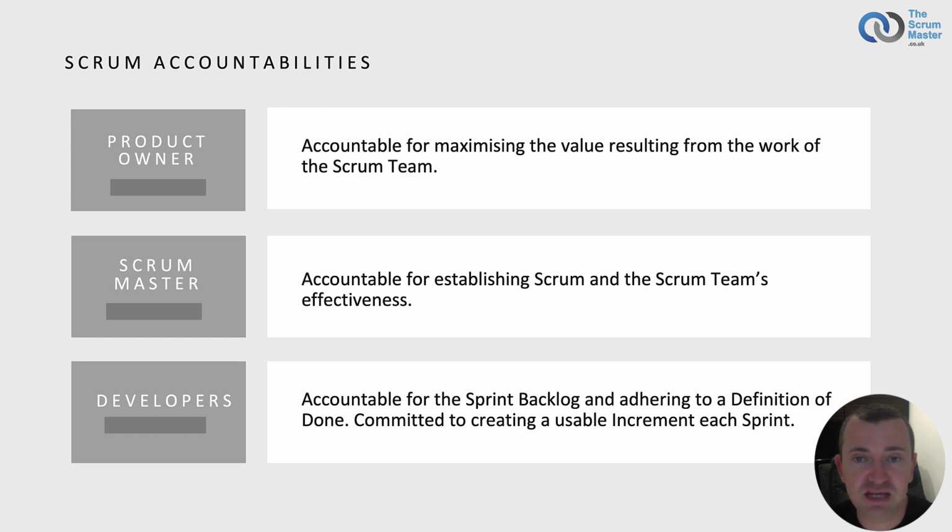Having 2 levels of team, the Scrum team and development team, was often confusing, so the language has changed to clarify matters. The development team is now referred to as developers. There is no longer a sub-team within the Scrum team. There are no longer roles but accountabilities for people inside the Scrum team. This is a subtle but important difference. The language used in the Scrum Guide has changed to encourage increased collaboration between people in the Scrum team and to reduce divisions between them.